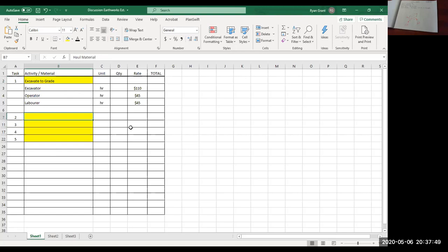So we've got all this excavated material now. So what should we do with it? Right. We need to haul off our waste because our oil interceptor is in the parking lot. So we need to have imported gravel backfill to backfill our oil interceptor. So we're not going to put any of the excavation back in the hole. So we need to dispose of our excavated material. So we've disposed.